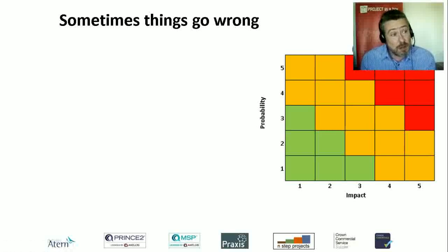And this is useful to know, of course, because we want to be able to estimate with confidence how risky a project is, and to understand therefore across the balanced set of risks, hopefully not everything we gave a low probability to happens, otherwise we're not very good at working with our risk estimates. But if only 1 in 10 of them happens, then okay, 1 in 10 of them has happened, and that's why we do this sort of bulk look at the risks and balance out that risk account, if you like.